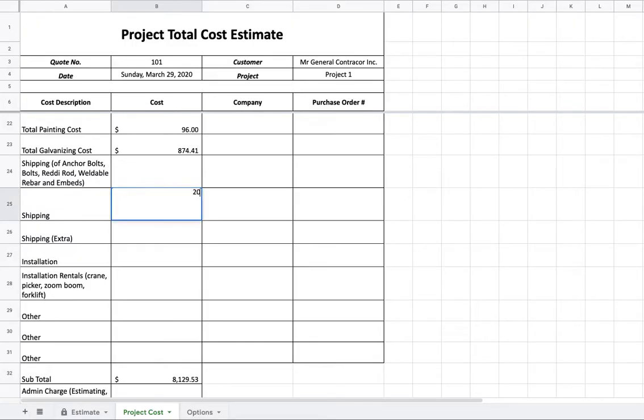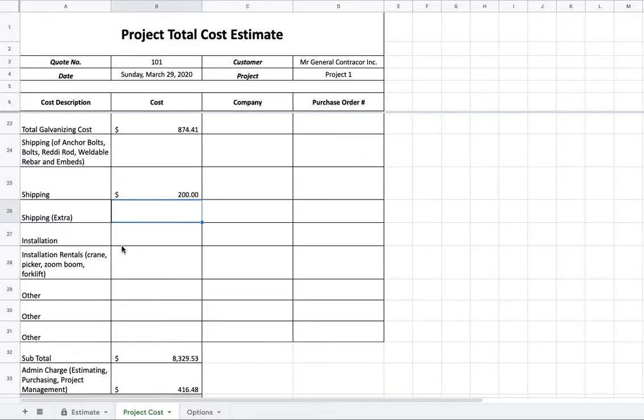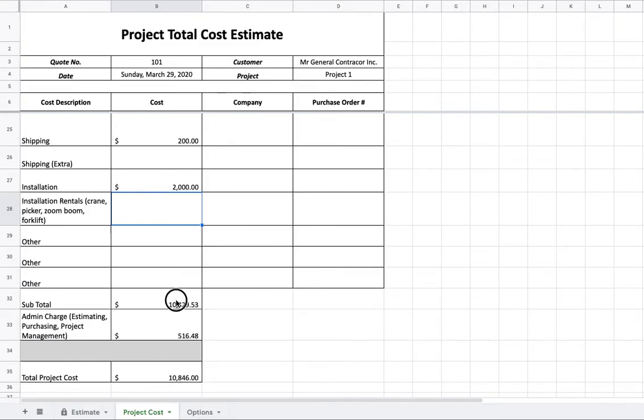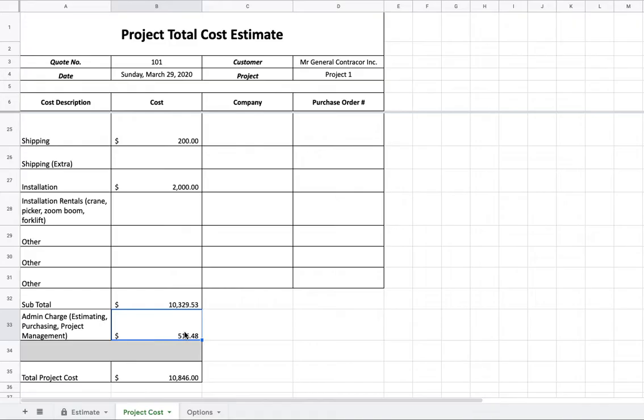So shipping, let's say we need $200 for shipping. Installation, let's say that's going to be $2,000. And any other things that you can think of, you can add in here. Look at that. We're done. We got our price already. It's a subtotal, and then there's an admin charge, which we'll talk about that in options as well. You can make your own personal percentage that you want to add to the subtotal. And then, boom, total project cost. Send it off to the contractor. Hopefully you win.